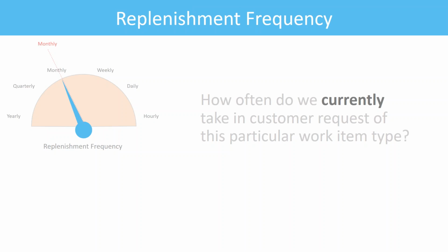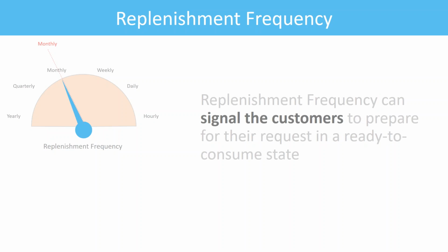So go back to your data, hopefully there is some. Jira is usually what people use. We're using Swift Kanban right now, and there's a great indicator of where our commitment line is and how we're passing the commitment line. And then from there, you can set a scope of 3 months, 6 months, even a year, it's up to you, and then calculate how many replenishments there are during this particular service, during this particular duration.